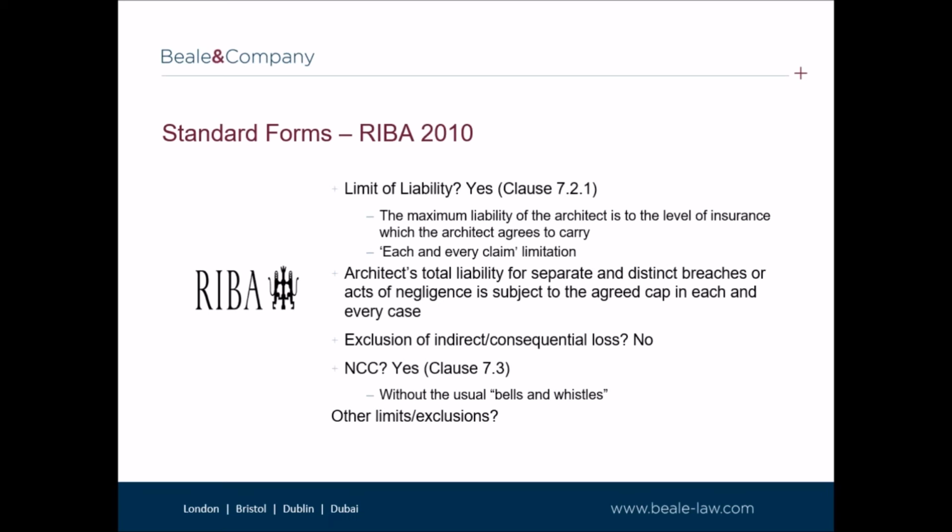In terms of other limits and exclusions, the REBA 2010 also includes provision for protecting employees of the consultant from direct claims by the client. This clause does refer specifically to negligence, as well as the defaults or other liabilities, and perhaps reinforces why an express reference to negligence should be included in any limitation clause.